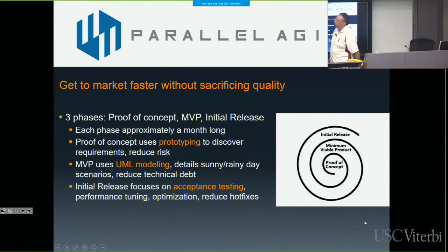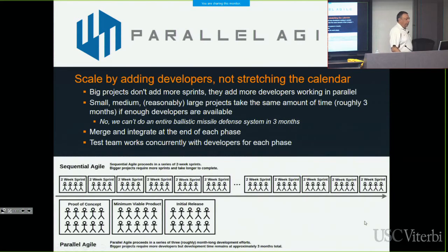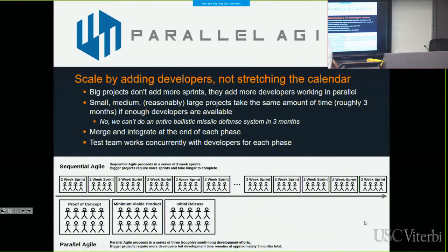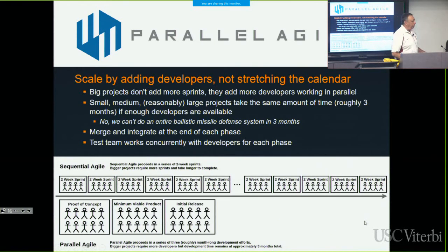So again, first you prototype it, then you design it, then you acceptance test it, okay? And what this really does is it changes the whole ballgame, since you've done a little bit more planning, you don't have to bite off a little tiny 2-week chunk. And you can think in a little bit longer horizon than 2 weeks, okay, by putting more planning back in. And then you can have larger teams of developers collaborate. And again, our initial expectations were that this stuff wouldn't really integrate back together, but in the projects we've been doing, it has integrated without too much trouble.